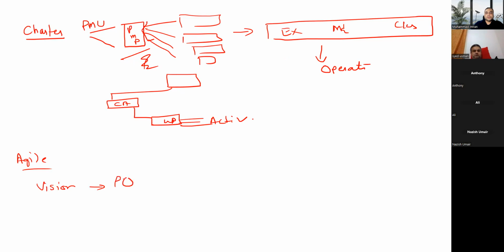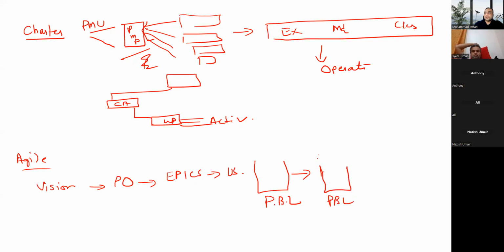We hire a product owner from the seller organization, or they allocate a product owner. Once allocated, the product owner brings the requirement in the form of epics. Epics contain what? User stories. So epics and user stories are going to the product backlog, and ultimately there is a prioritized product backlog, and you will prioritize based upon MoSCoW or Kano analysis, or we have dot voting or multi-criteria or customer-based prioritization, where the user story which has the highest value and highest risk will be delivered first.